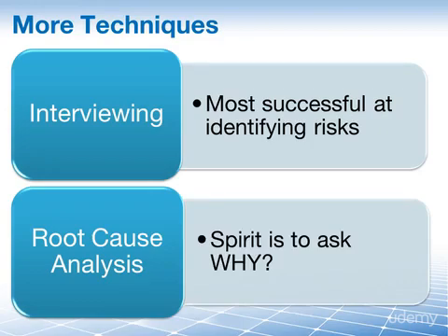If you identify a risk, ask, why do we have this risk? And continue asking until you are satisfied that you have found the true underlying cause. Once causation has been established, you can develop corrective and preventative actions.